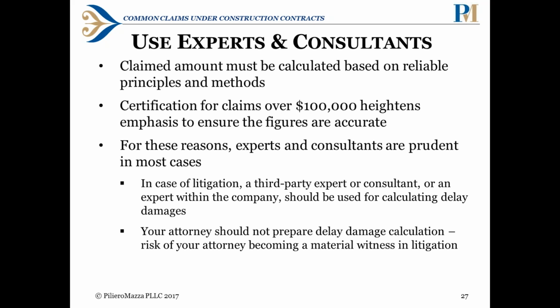And that's, as the second bullet notes, you're certifying that this claim is accurate if it's over $100,000. So that's even more incentive to make sure your numbers are accurate. In the case of litigation, a third-party expert or consultant or an expert within a company should be used for calculating delay damages. As I said, we've used experts for that purpose. You don't want your attorney doing that because your attorney could be a witness then and have to testify, and an attorney can't really serve both roles at the same time.